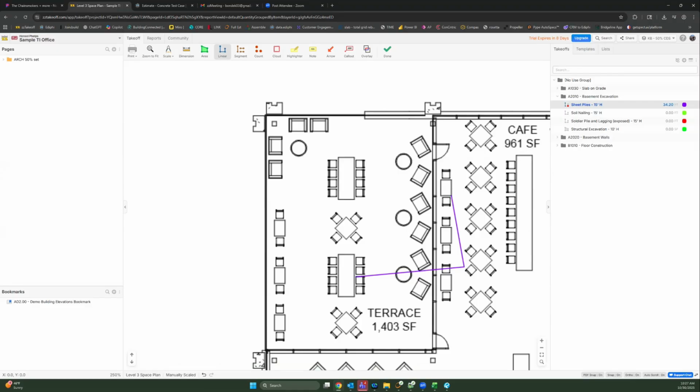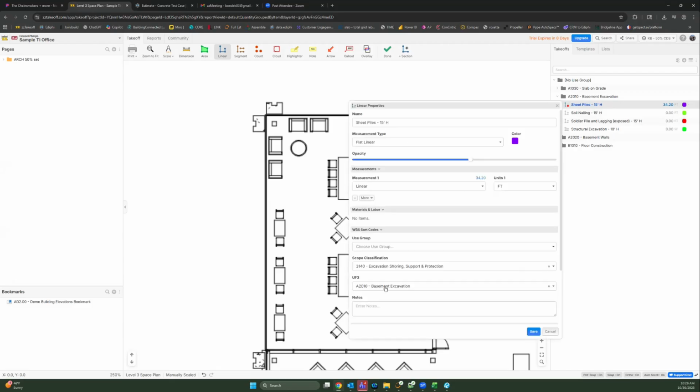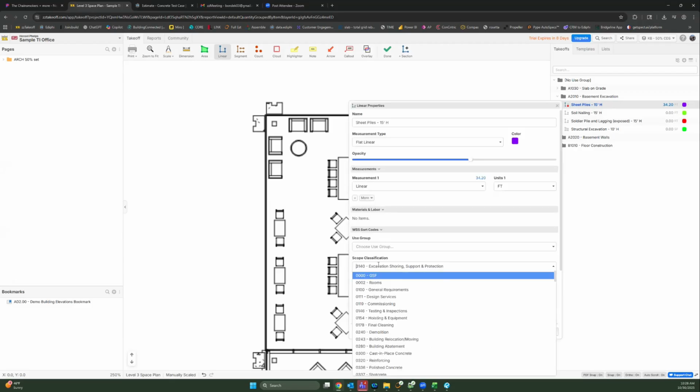A lot of customers are doing that when they're awarded a job. They'll take the job and duplicate it and keep one as their unchanged version when it was awarded to them. And then any change orders and everything they do in a new copy. That way they can reference the original anytime.